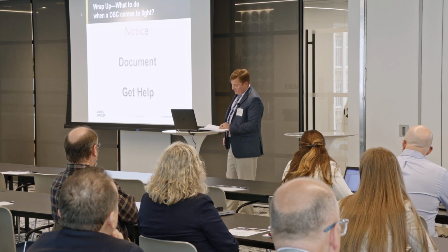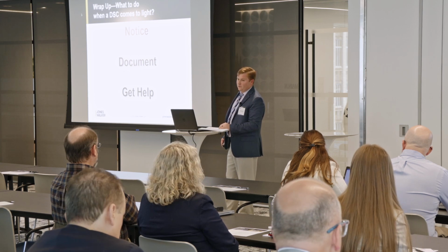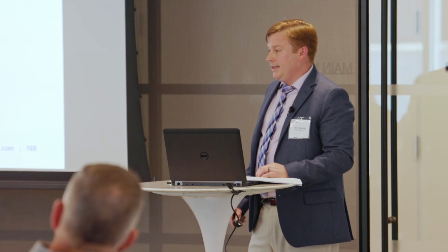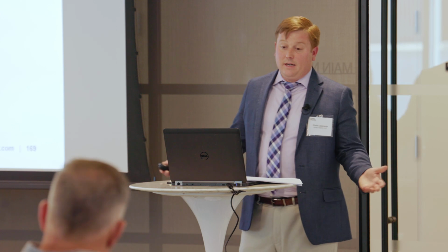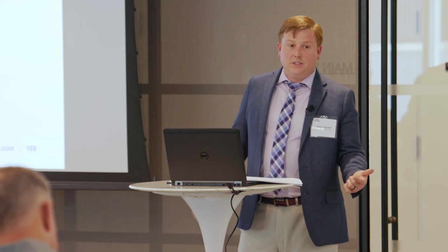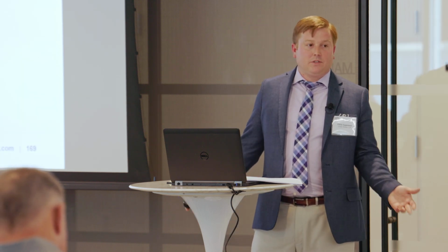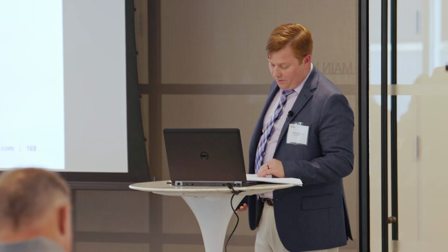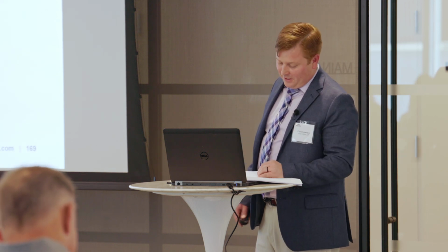Consider employing a geotechnical expert before the conditions are disturbed. It'll help you down the road with entitlement and quantum, and could help you right then and there to determine, one, how you can deal with the issue, and two, sort of armed with the technical information that early on to have the discussion with the owner about why you believe it's a different site condition. It's tough, as many of you have been involved in litigation. Doing this 3 and 4 years after the project has happened is much more difficult than doing it in real time.